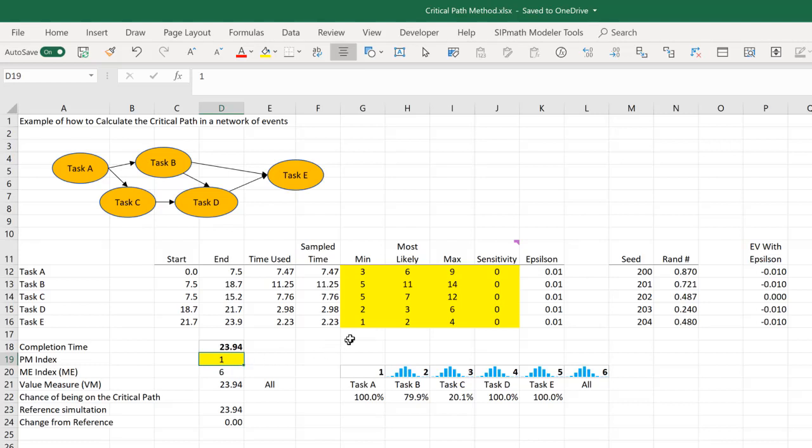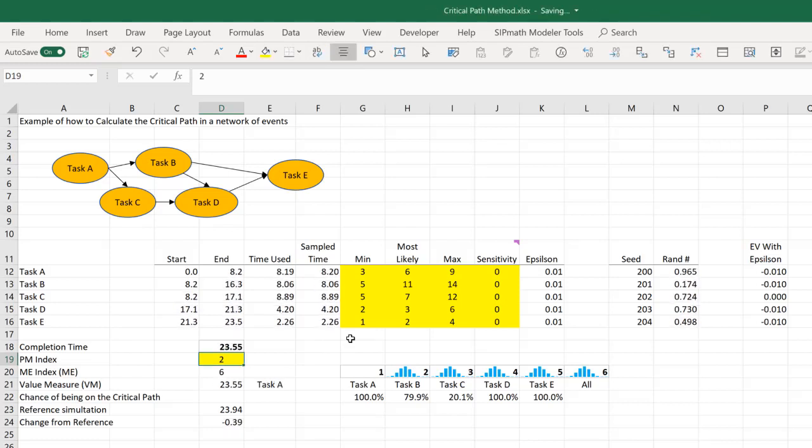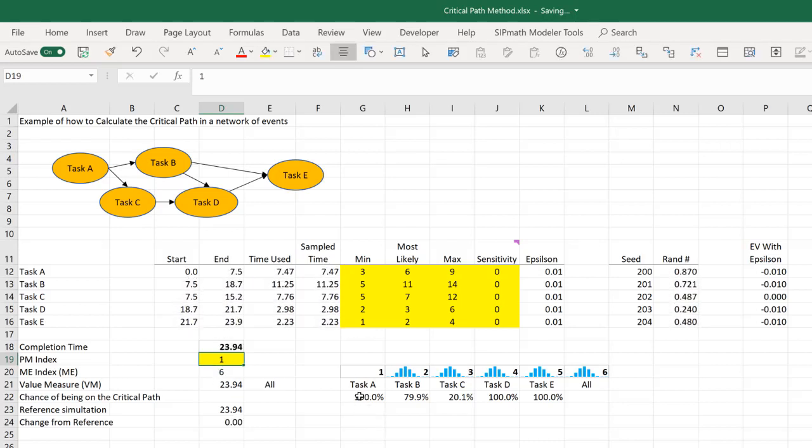Now down here, it's calculated the probability that each of these tasks is on the critical path. We can see that B is on the critical path almost 80%. Task C is on the critical path 20%.